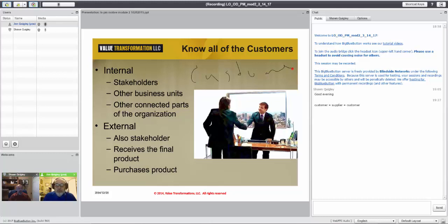Exactly. So when you're making your key events and milestones on your plan of action or your project plan, you should be tiering your key events so that you have three groups aligned to that event. The one who's going to make it, the one who's going to test it, and the one who's going to produce the design, so that both parties know where they're going with it.